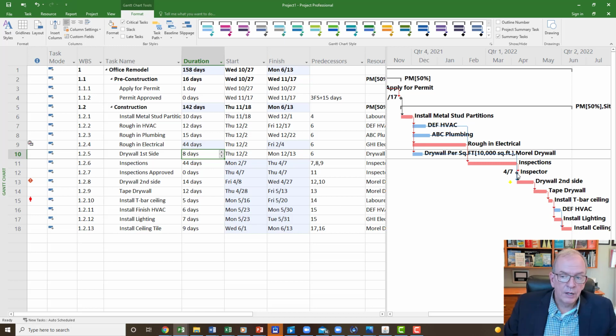You could even put deadlines on your milestones, right? So that then it flags once your milestone moves, key dates. You're not going to put it on every activity. That's just too much work. But I mean, it doesn't really make sense either. You can track your activities. But if there's something coming up that you're really concerned about if it moves, that would be a concern.